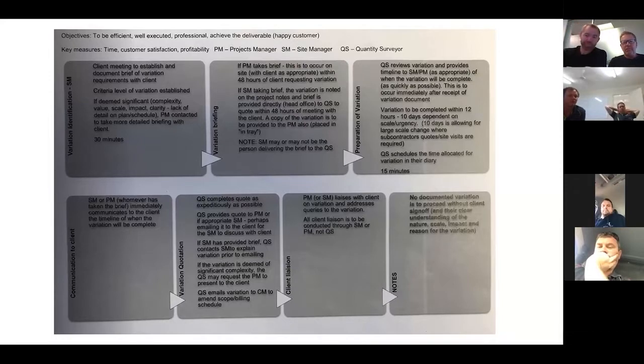No. What if you have some really fancy LED light that's $800 that you need to get a quote on? I'm just thinking if you've got something really weird or wacky. What you might do is get them to send you a retail estimate, because all they want is paperwork. It's not a fixed price quote because you haven't engaged them yet. But you want a costing of this product, and then you'll ideally get a discount off it. Ideally, you'll have your office manager, project manager or QS do the running around to get this.